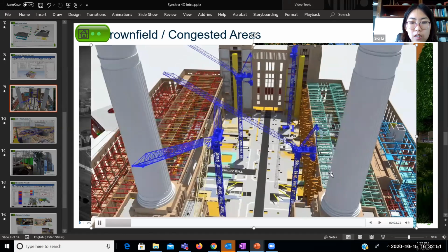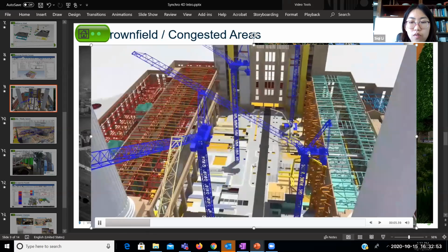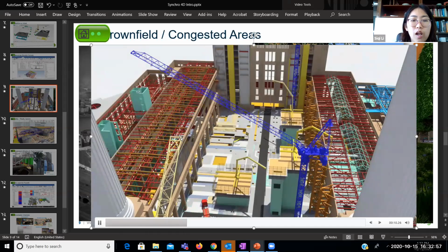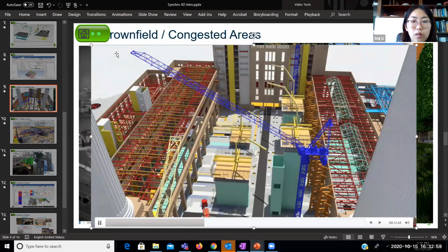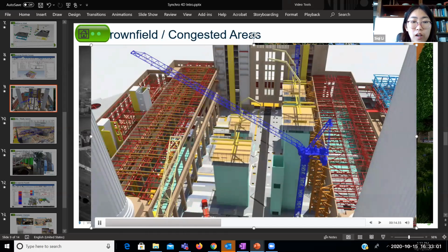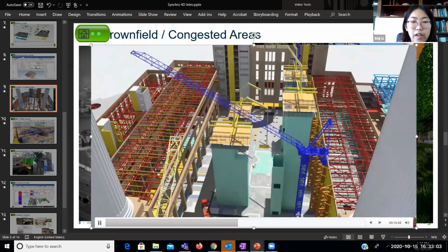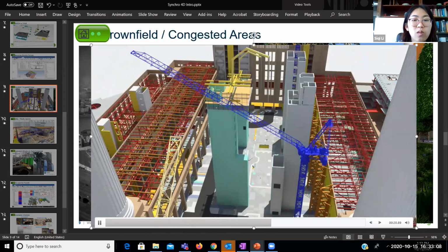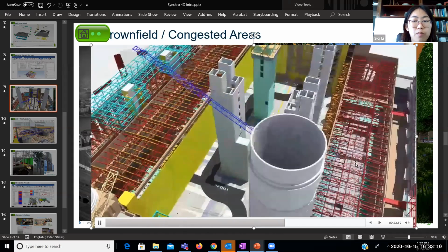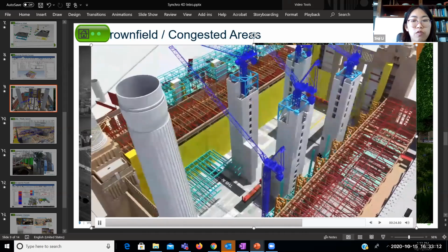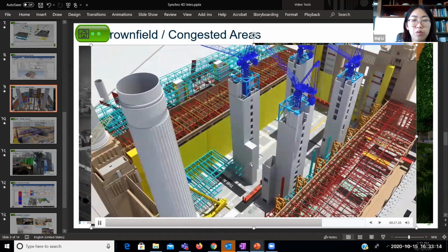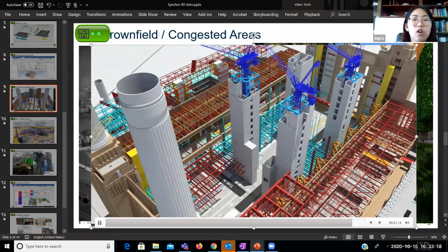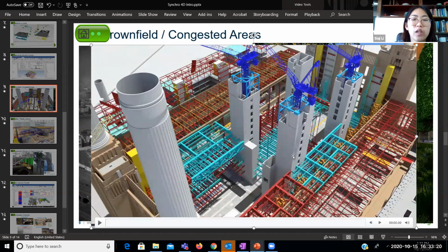Each task should have a very detailed 3D object linked with it. So it's a very detailed model, and you want to link it very precisely with very detailed tasks, which is a complex assignment. Then it will take a few days or a few months to finish this 4D simulation. So it's really up to the decision of the project manager to decide the level of detail of the assignment and how long it will take.